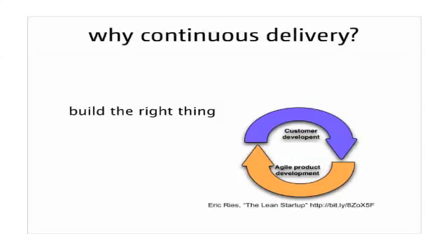And whenever we decide we're going to build a product based on software, what we do is we come up with a hypothesis. Here's a business idea. We think this will be valuable. And then the most expensive thing you can do to test that hypothesis is to actually build it. So we shouldn't do that. What we need to do instead is create this really tight loop where we can come up with ideas, produce the smallest possible amount of work to validate whether the idea is valuable, get feedback from real users on that idea, and then cycle.